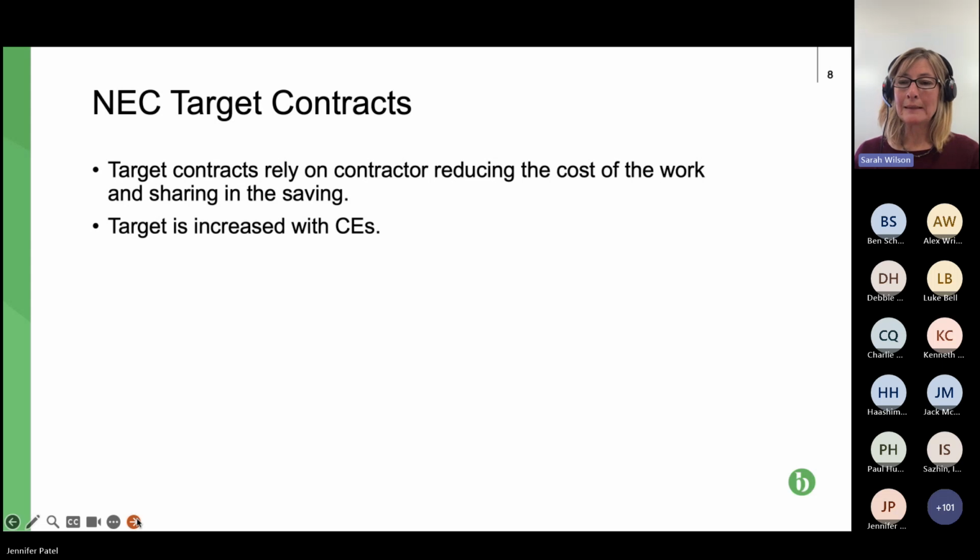So fundamentally, the pain gain sharing may not be agreed when it's finally carried out by the project manager. And it may be that the contractor subcontractor has to adjudicate to ascertain the value of all the compensation events that are in dispute in order for the proper value of the pain gain sharing to be ascertained. We'll come on to that a bit later.